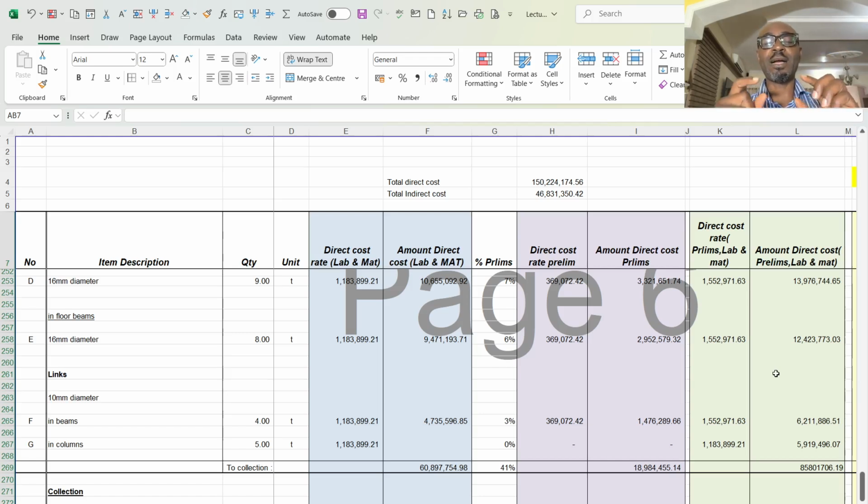So in this case, the approach is not different from what you would do even if the two bills are separately prepared. But eventually, in the end, before you present to the client, is for you to infuse or distribute that cost which you have computed for the total, what it's going to cost you to run the site and provide all the indirect services to the site.